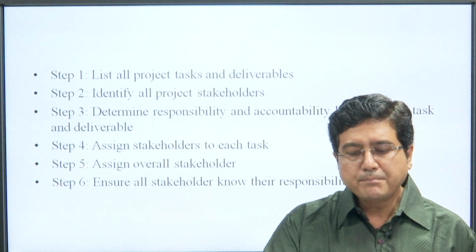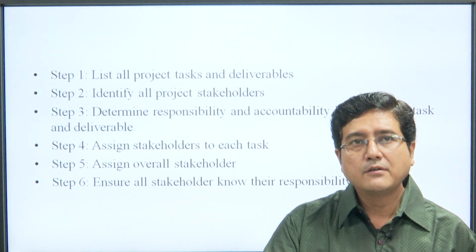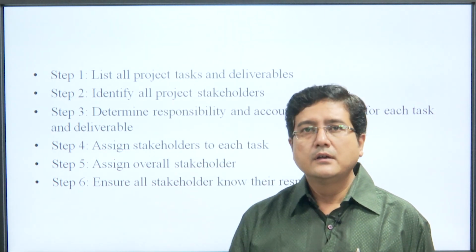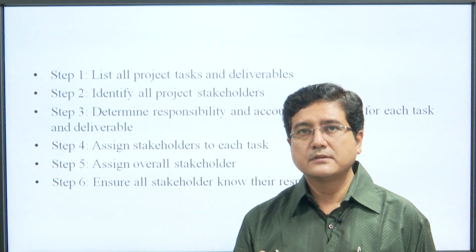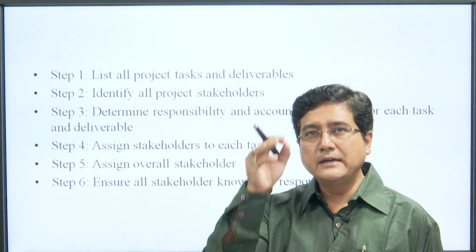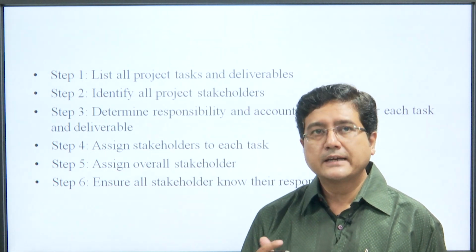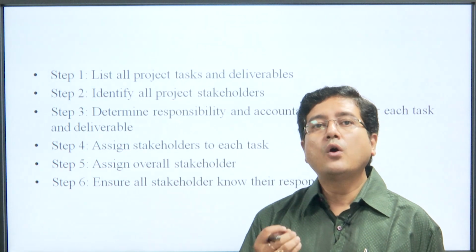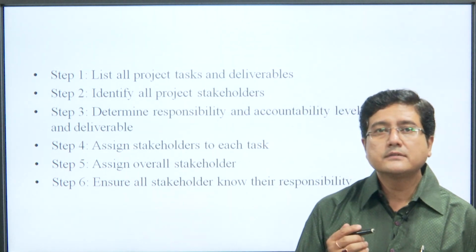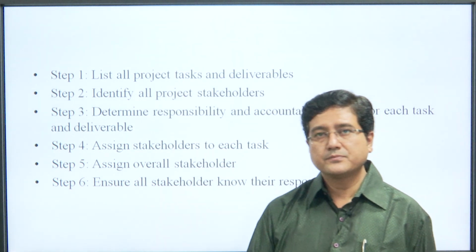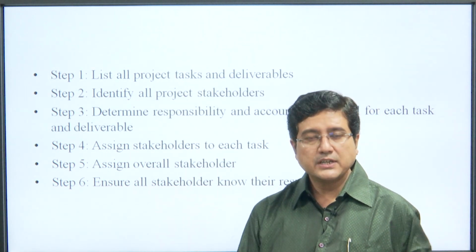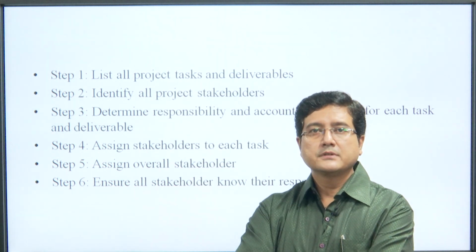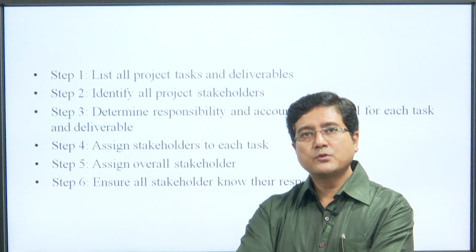The first of our six steps for the RAM is to list all the project tasks and deliverables. So we must list them. Second, identify all project stakeholders. We need to identify all project stakeholders, and put their names.